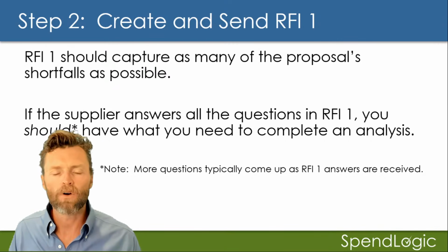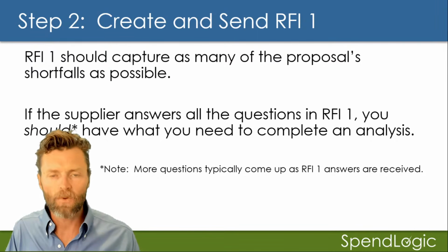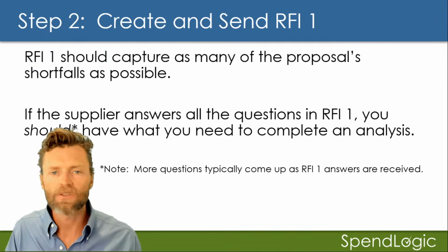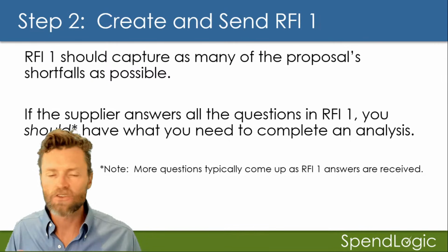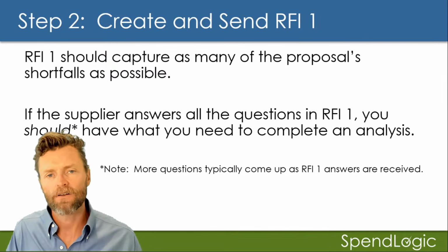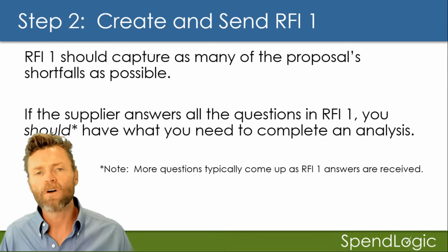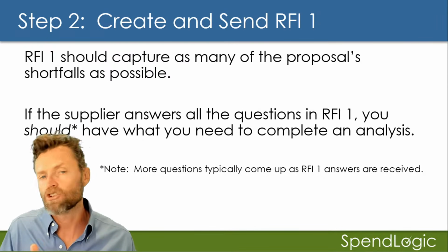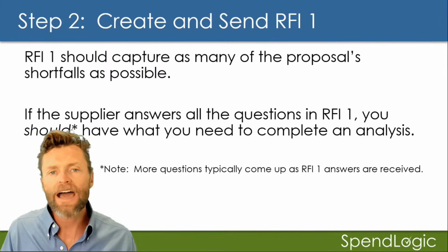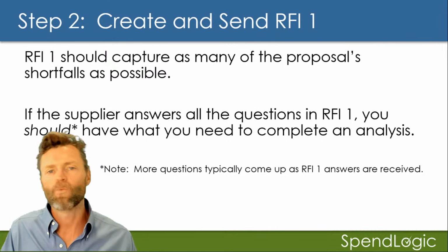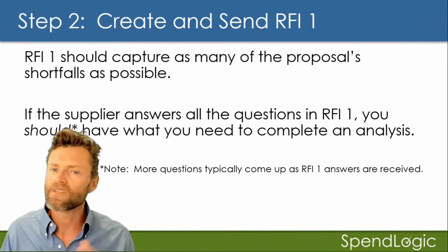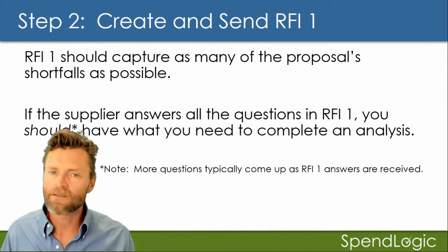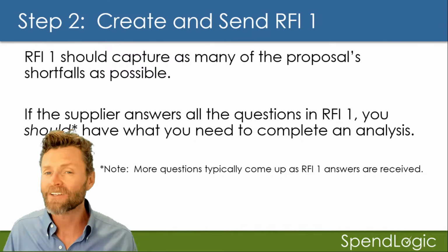Before we send RFI 1, we have somebody internally look at your RFI 1, look at the proposal, make sure that there's no holes in it, make sure that we haven't missed anything. Once you get responses back from RFI 1, the theory is that you should have enough to do your cost analysis. Now I say should. When they provide you data, in some cases it may not be complete.